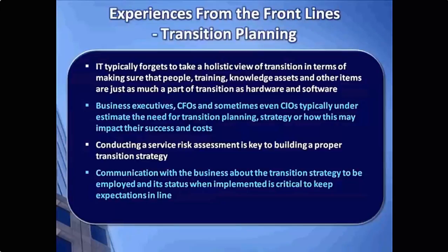What happens if that cutover on Friday night doesn't work? What will you do? What happens if the solution is in place on Monday morning and it flat out doesn't work? What if it's giving wrong data? Think of those kinds of risks in advance and put that into your transition plan so that there's fallback in the event that things don't go as planned.